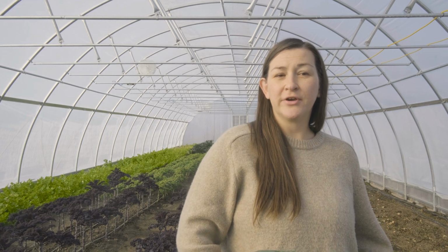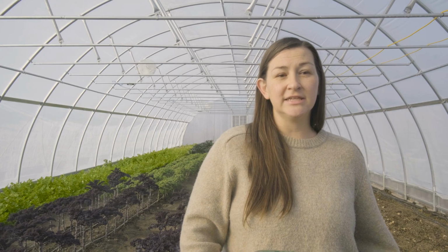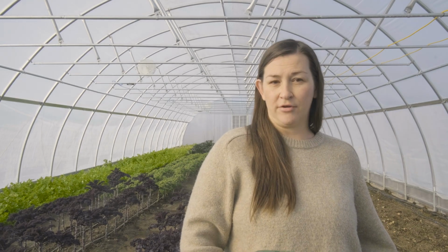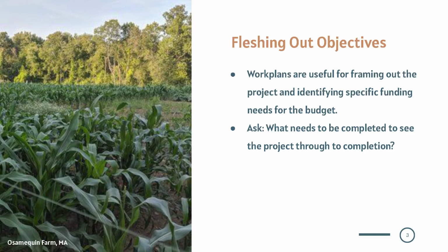As you develop your grant's activities, you will also want to cross-reference the RFA, RFP, or NOFO to ensure the activities you want to include are fundable. Most grants will explicitly list ineligible expenses, which will help you understand which types of activities are not allowed. It is best to go into the work plan creation process with a strong understanding of the grant program you are applying for and be well versed in what it wants to fund.